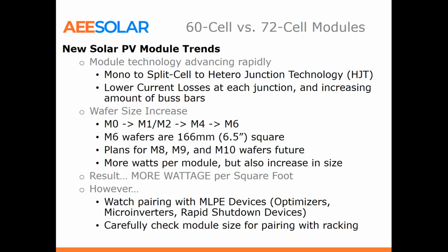Aerocompact as well, their windscreens and their ballasting trays just didn't fit some modules that were there, and they had to do a complete redesign there. So please carefully check there, use any sizing tools that are available online, and check with your manufacturer prior to ordering product.